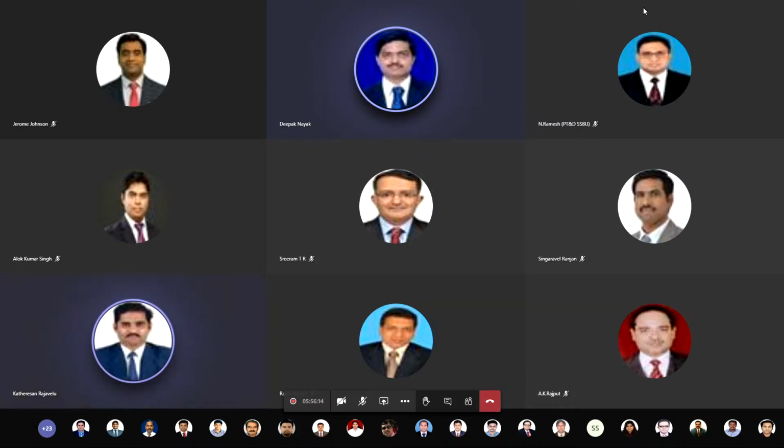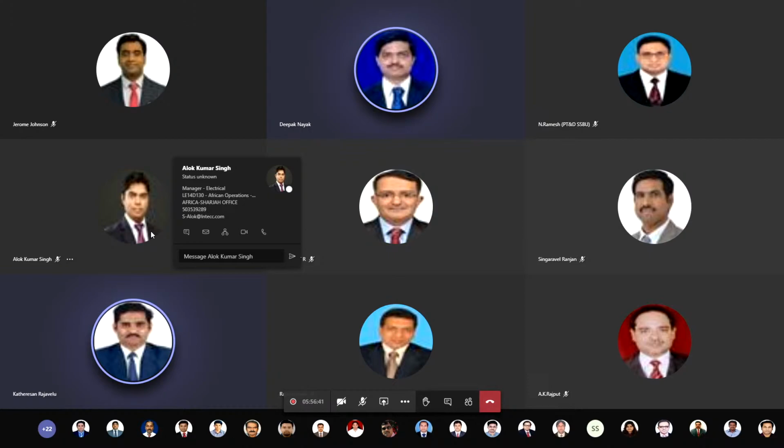So substation view has now agreed. As soon as they are L1, there is a trigger through CRM. Now Africa is also implementing CRM. So the trigger can be given to the respective stakeholders like the engineering head and the procurement head, where they can start the process of techno-commercial evaluation and commercial negotiation. Of course, the confidentiality based on the geography needs to be looked at. I'm not very sure whether it is possible in the Africa market. But I understand that in some geographies it will definitely be possible to look at these initial things before we start the real procurement after getting the order.